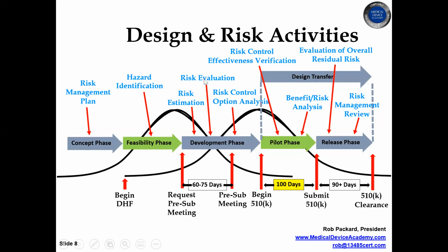These are risk estimation and where you're comparing different risk control options. So should this be battery powered? Should this be electrically powered? How are you going to address each of the possible risks of your device, and how do you trade those off? How do you quantify them? And that's something you have to document in this phase as you're considering the different design options and coming up with prototypes and testing them to see if they work.